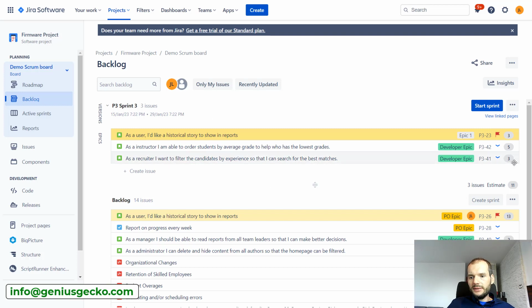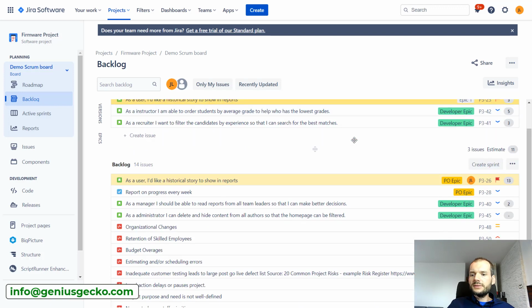Okay, so at the moment I have 11 story points in the sprint. I could do more. Another task in my backlog is estimated at 13 story points. That's a bit much. Normally we shouldn't put such large tasks in our sprint, because that many story points usually says that this task is not yet properly defined. We do not know everything that should be done. Here we just know that this is large. This task should be split into several smaller ones, and basically each of them should have smaller estimates.